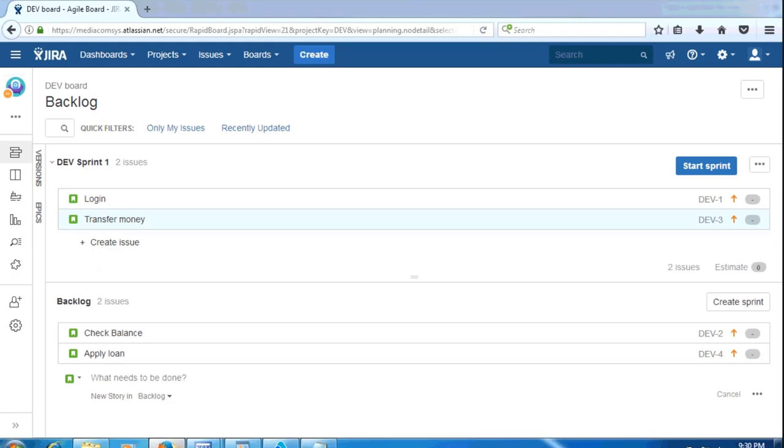Again, how can this be done? It's teamwork. As I mentioned, in this sprint planning meeting the entire team is going to attend, and it's a team effort, not an individual effort, right? Whenever the Scrum Master says, hey, tell us guys, what is it going to take for this login story to complete? Say, for example, you have 5 team members, then 2 people say it's going to be 2 points, and the other 3 members say no, it's going to be 5 points, then we go with the 5 points. Again, estimation is always an approximation, right?